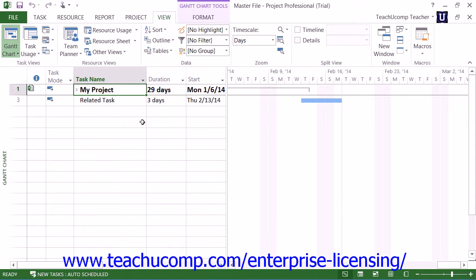After you've created your master project file and linked the necessary subproject files, you simply create the task links between the files as you normally would. Note that this draws task dependency arrows between the tasks in the master project file.